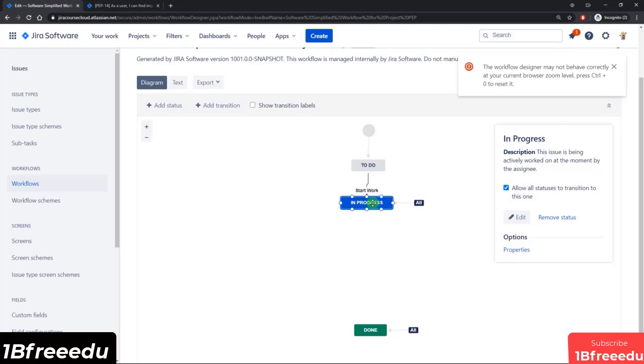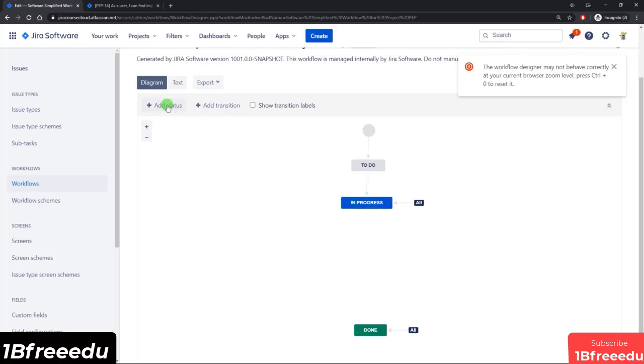So by coming in here and modifying the name would actually modify it for all the other workflows as well that is using the status. So be really careful. I always recommend, or it's always safer to not modify an existing status unless you know for sure that this is the only workflow using it. It's always better that if you have a status that you need that doesn't already exist, just come in here and create it as a new status. Okay, so just keep that in mind.